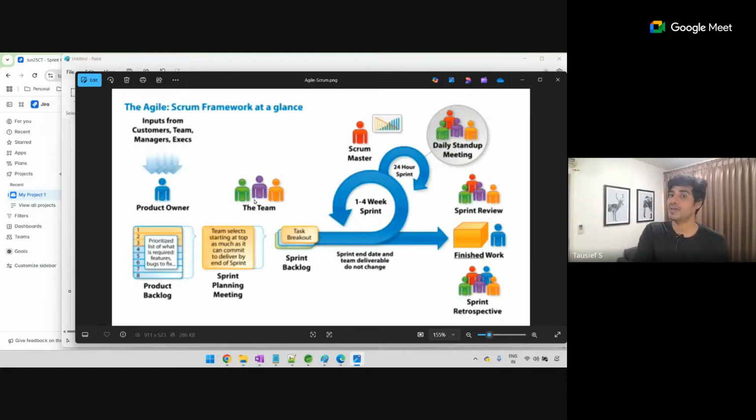So team is very happy. You want to go for a leave. Every company will give 15-day, 20-day official leave. You can go for a leave. You can say one week, I don't want to be there because I'm going for a travel vacation. Tell that during sprint planning meeting. They will all consider, okay, so this guy wants to go. Just for one week, they will not plan your work. They will take less items in that sprint.